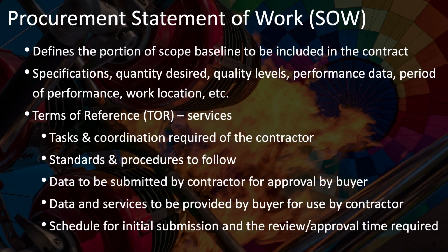How detailed does it need to be? That depends a lot on the audience. When you create your scope baseline for internal use, you can usually get by with much less detail than when you're outsourcing the work. This is because internally, you can rely on your organization's culture, policies, procedures, and structure to fill in these details. Your organization will have certain expectations of quality and safety and such that you don't have to spell out for your internal resources, which you will have to provide in more detail when you outsource.